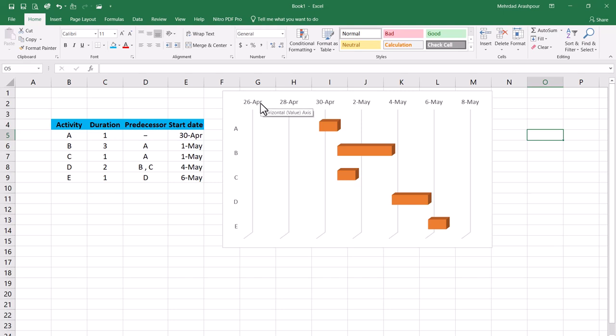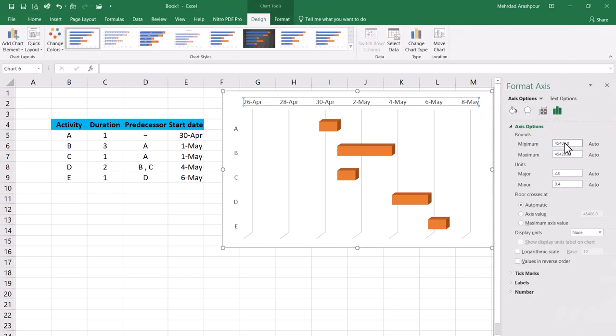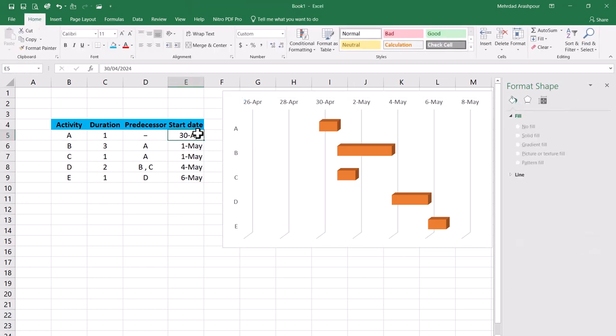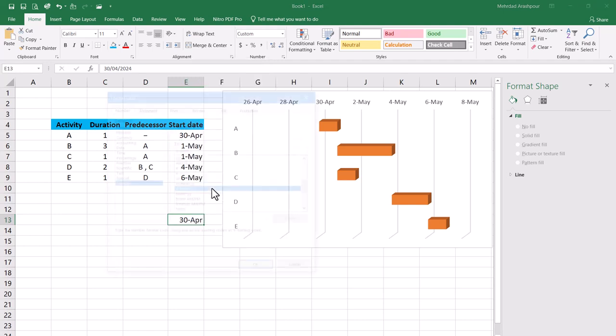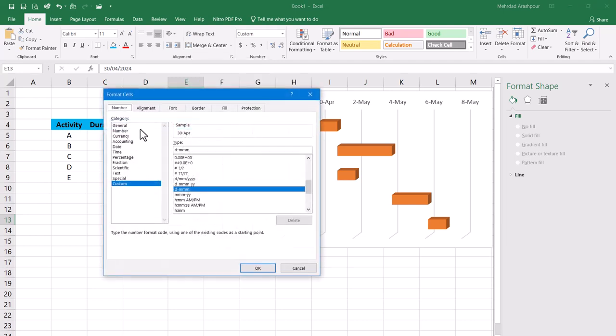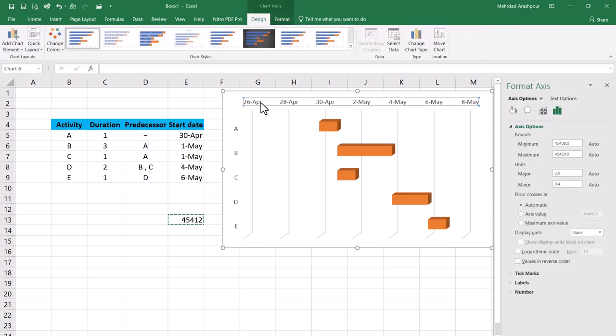After that we can shift the bars to the left of our diagram by double clicking on dates and changing the minimum bound. Unfortunately Excel uses a general format instead of the actual date. However there is a workaround procedure that we can apply. Copy the start date of our first activity and paste it into an empty cell. Right click on that and from Format Cells choose general format. Now we can use this value as the minimum axis bound.